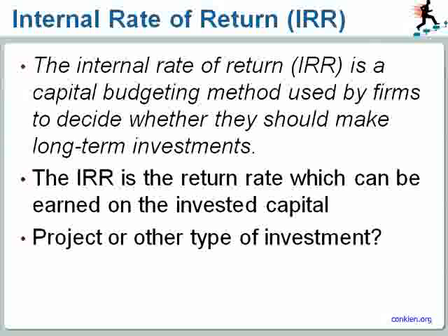For instance, if my internal rate of return is 7%, but I could invest this money into, say, buying bonds from the bank where I get 9%, okay, probably a fictional number, but still, I get the higher return if I just put the money to work when I give it to the bank.